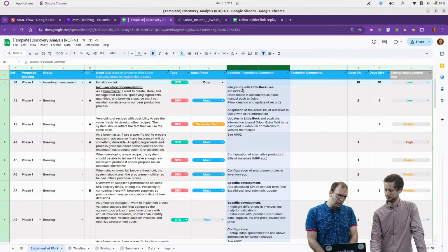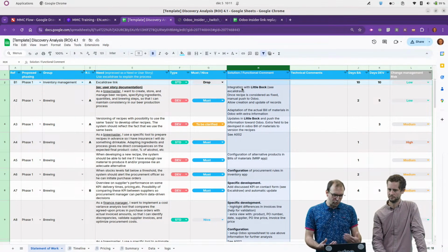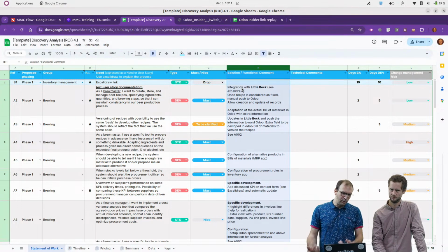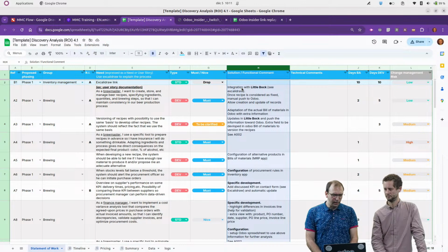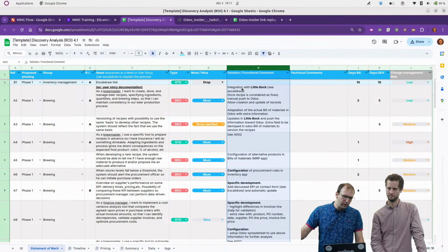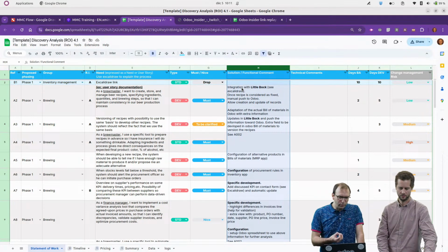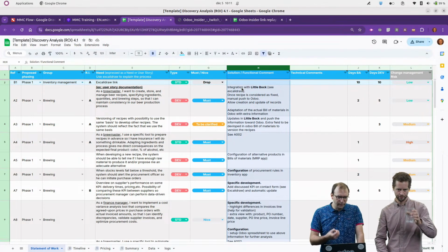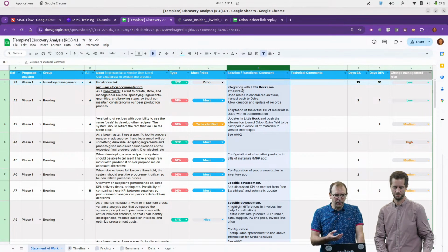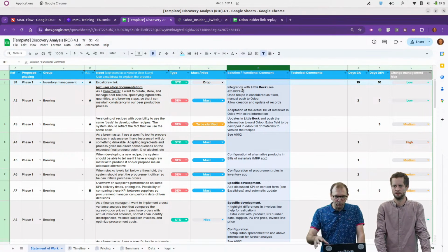And as Greg explained, to collect those needs, we have workshops with the customer, and the idea is that after every workshop, we try to already put the needs into the file to make sure that we will have a complete file and a complete view quite soon, and not wait until the end of all those workshops. And as Greg said, it's super important to go deep and to understand what's behind something that's asked by the customer, because sometimes they just say, I want this report, that information, but you really have to take the time to dig deeper and understand why this is needed,